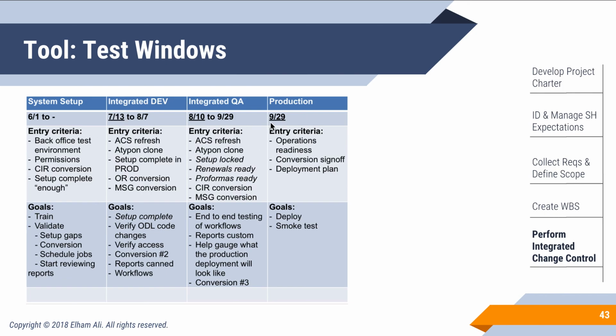You see here underlined that we've changed the dates in accordance to their expert criteria, and I've allowed changes to be approved in accordance to our board because we've had different requirements change from our project sponsor, but also my team were the experts in developing this product. One of the key things I always give advice on in terms of how to manage stakeholders is that, one, you want to listen to them. You want to get their input and understand where they're coming from, but also get expert judgment. In this case, my team member was the expert judge in understanding how quality assurance for this product would be scaled up for a larger audience.